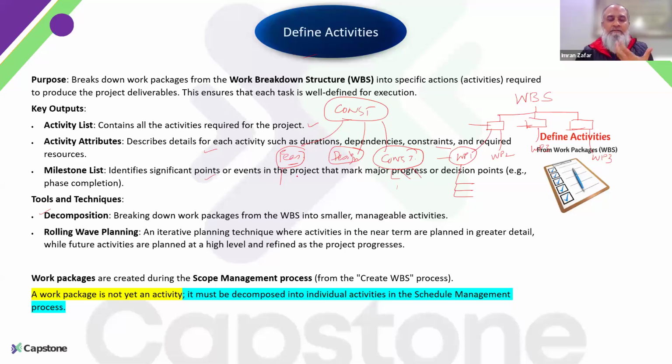So maybe initially when we are building our work breakdown structure and defining the activities, we only define the work packages and the activities for these two milestones. Or maybe initially I am doing it only for the feasibility part, because the feasibility can affect my design. So initially, our work package or activity list is planned in detail for the feasibility part only.